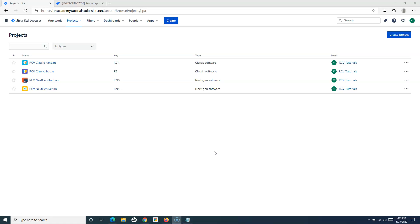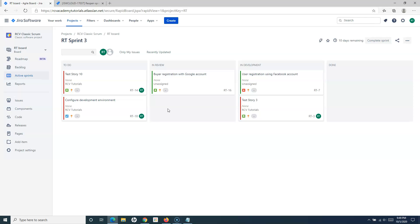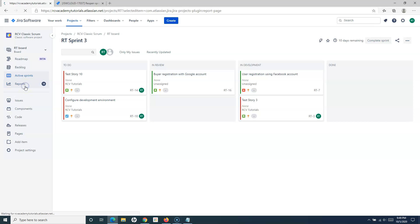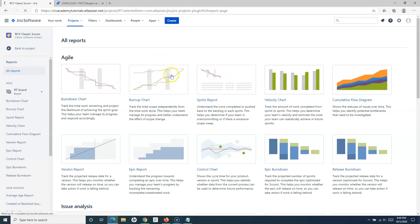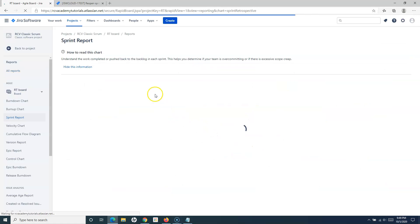Let us cover the classic scrum project first and see how you can reopen a closed sprint in Jira. Reopening the sprint is required multiple times — for example, if by mistake somebody closed or completed the sprint and you want to reopen it. Reopening is not very straightforward because once the sprint is closed you cannot see it on the board, so you have to go to Reports.